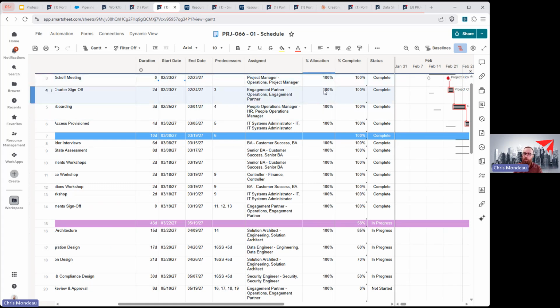So when I'm leveraging things like resource management, I really like to draw that conclusion that it's task management. That's all we're doing. What's the task? When is it due? And that's the minimum. But if you're trying to get insights into resource loading and who's working on what, you only have to add in when you're planning on starting this, and then how much work or effort you're going to be working on that, represented by that allocation.